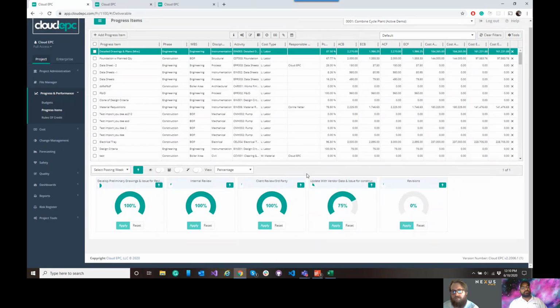And so you have the ability to load simply all the hours into the system and hide cost in the view through a very simple permission. In the demo account, I do expose cost, but the reason for that is oftentimes the cost engineer or the quantity surveyor rather may not need all the cost information, or you want to allow your vendor into the system and you simply want them to update their progress, but you don't want to expose all of your project cost.